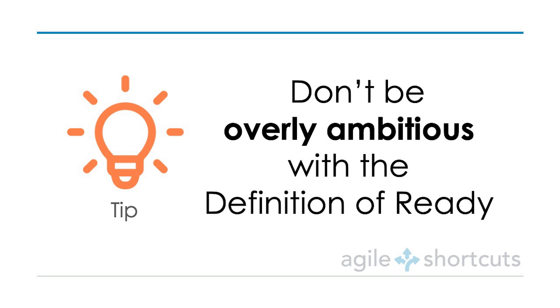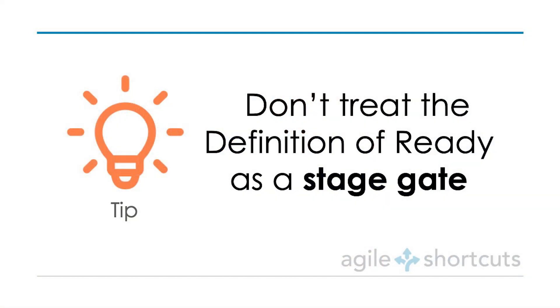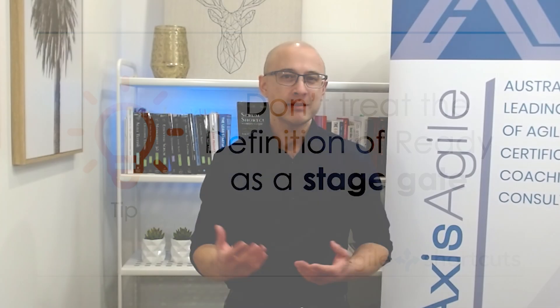Two more tips: first, don't be overly ambitious with the Definition of Ready. Having none is a problem, but having too many items on the list creates a bottleneck and slows the team down — coach your team and the product owner accordingly. Second, don't treat it like a strict stage gate. Look at it as guidance. If a team doesn't meet all the criteria, you might still be able to start working on it. Relax the Definition of Ready if needed rather than blocking the team.